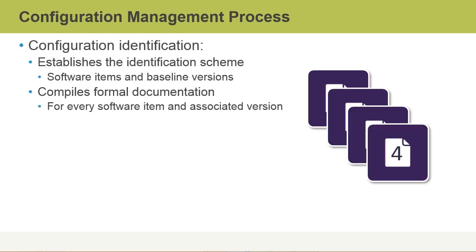The next phase of the configuration management process is configuration identification. This establishes the identification scheme to be used by all the software items within the baseline. Also in this phase, we compile our formal documentation, which involves documentation for every software item and its associated version.